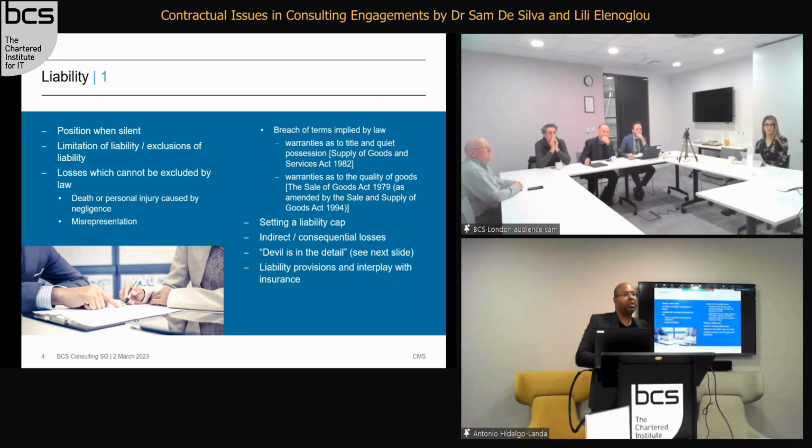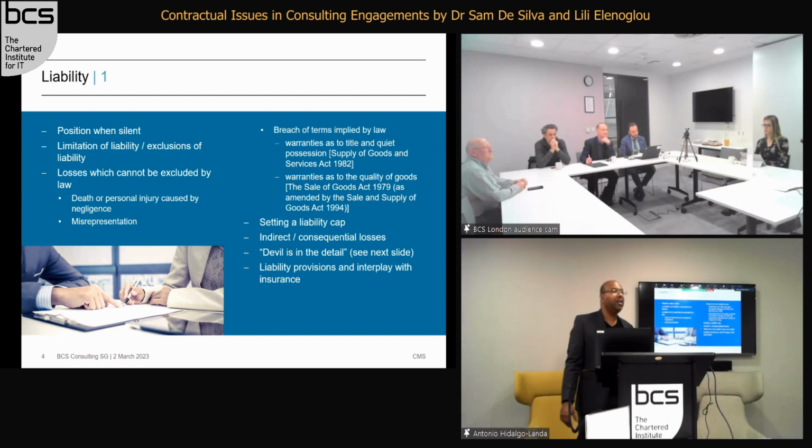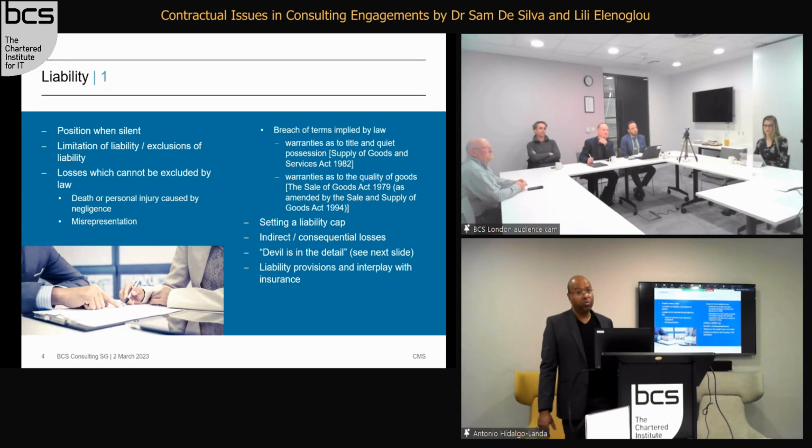Yeah, so that would be a breach of contract. If you agree a particular timetable to do something and you don't deliver in that timetable, that will be a breach of contract, and that's why it's important to have a limitation on liability clause to limit your liability in that scenario. Yeah? That's right. Okay. And do you want to also say that time is not of the essence in this contract? You don't necessarily need to say that. Most clients would sort of refuse to accept that. Ideally, if you could put that in, put that in.